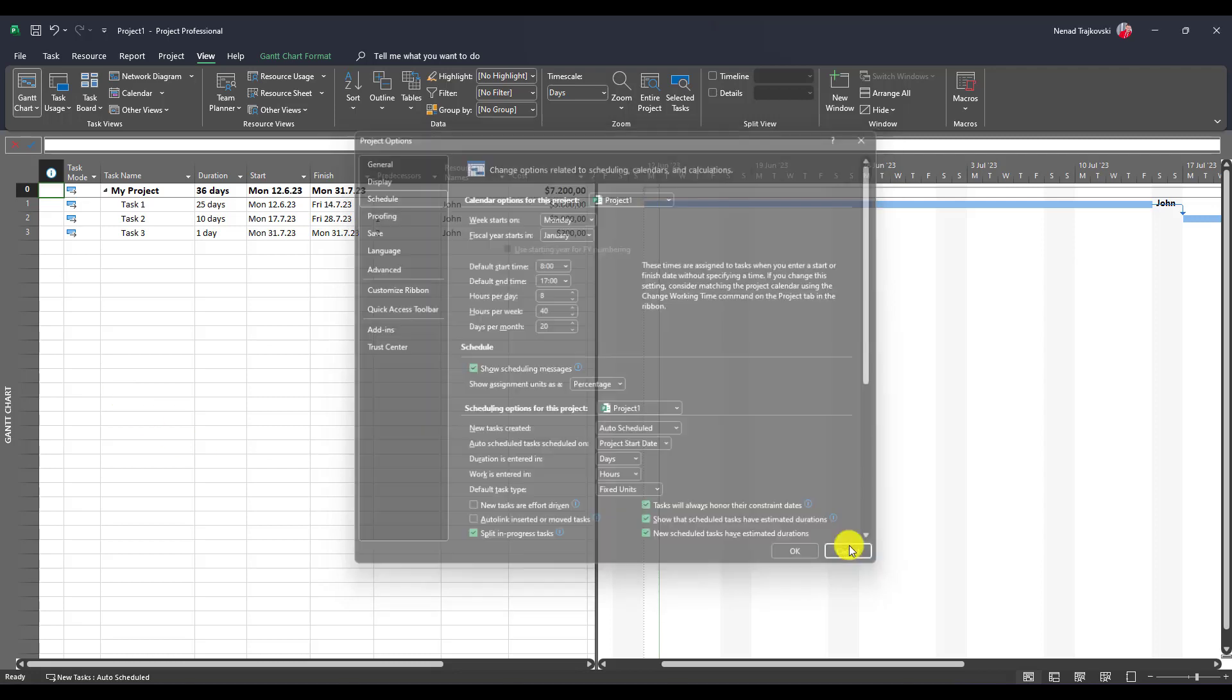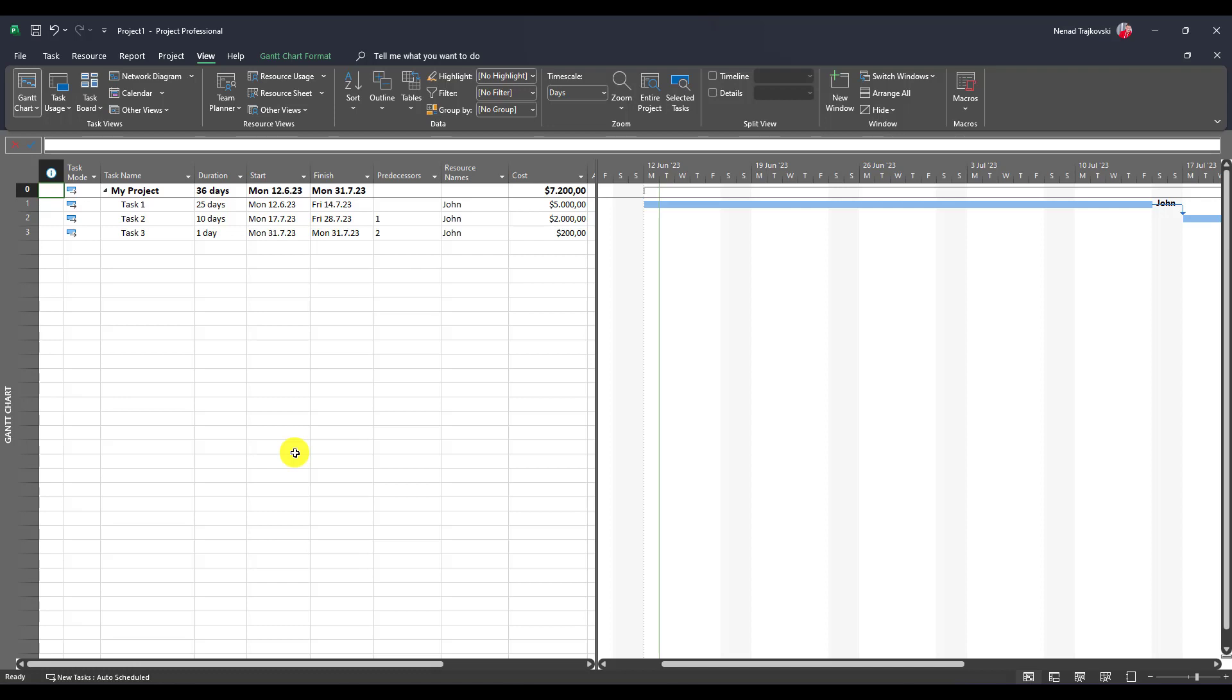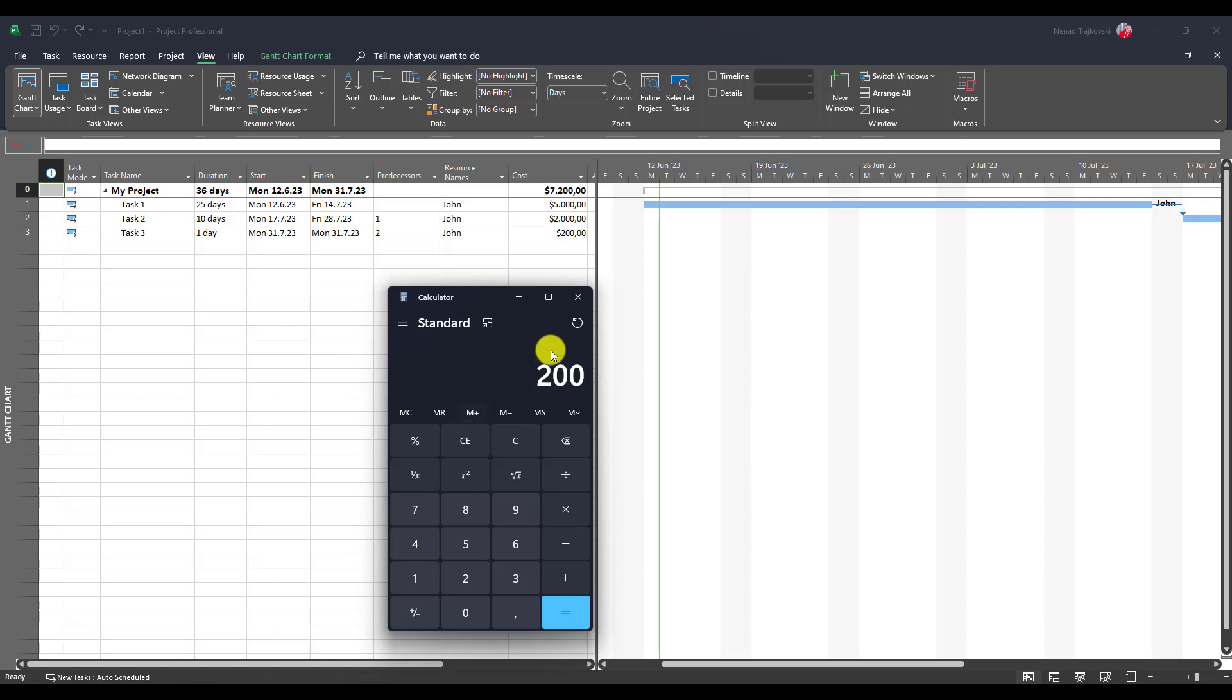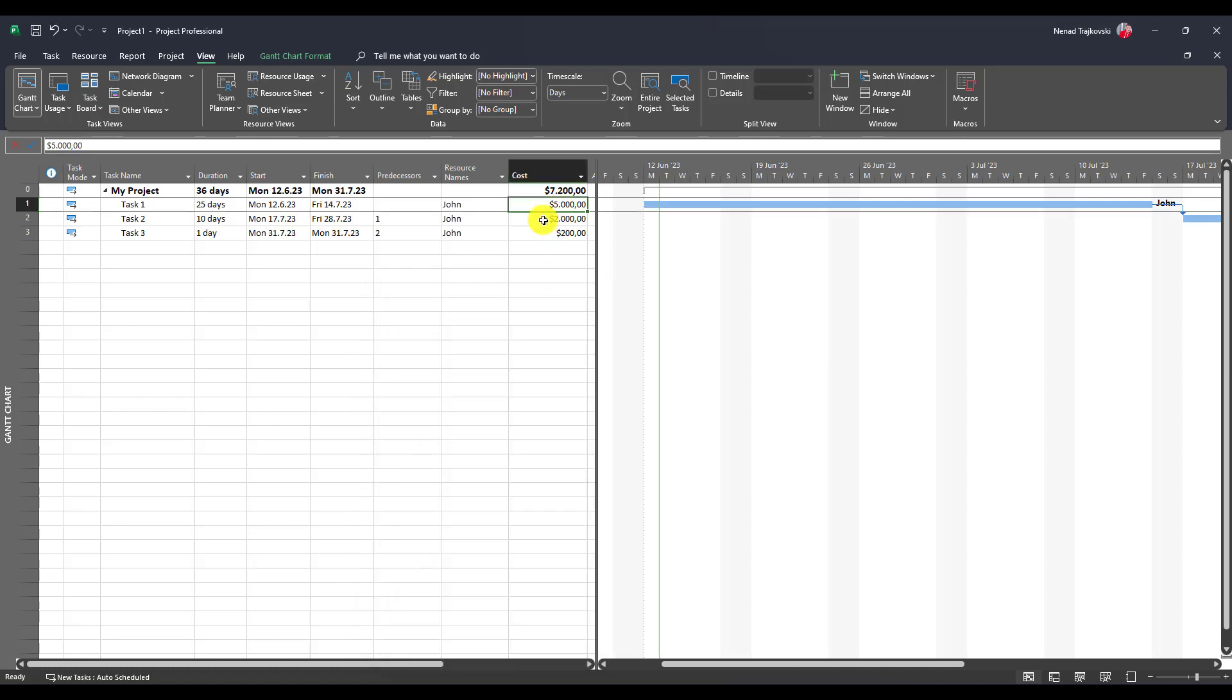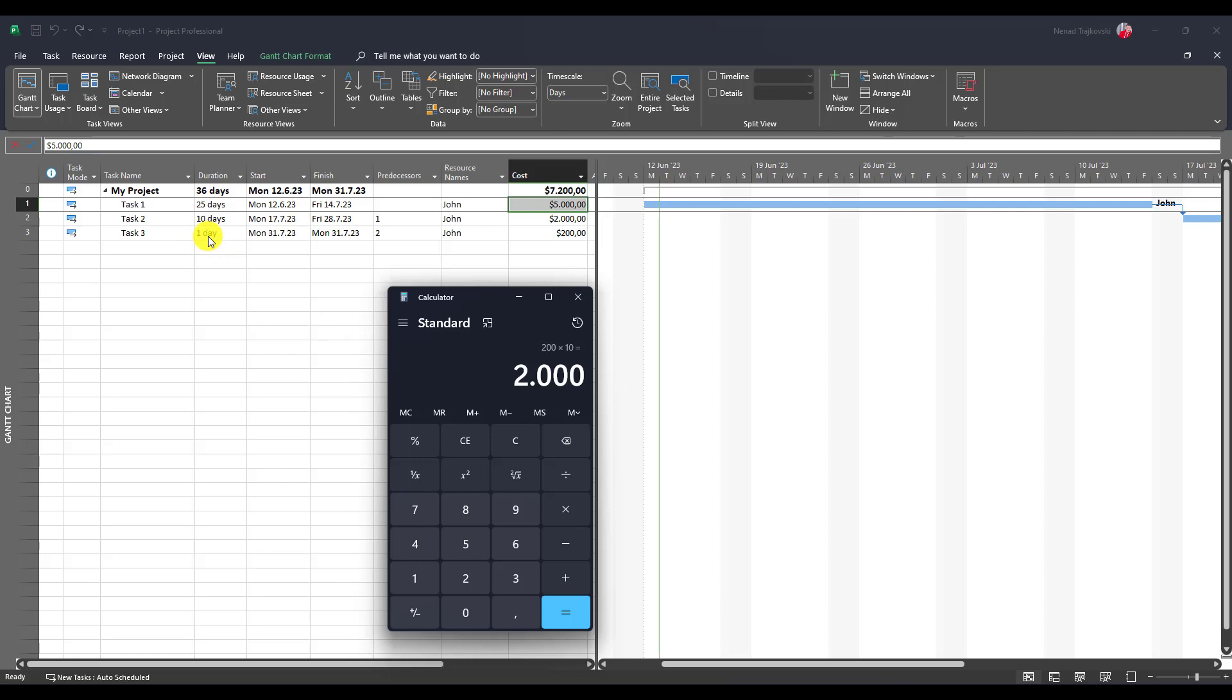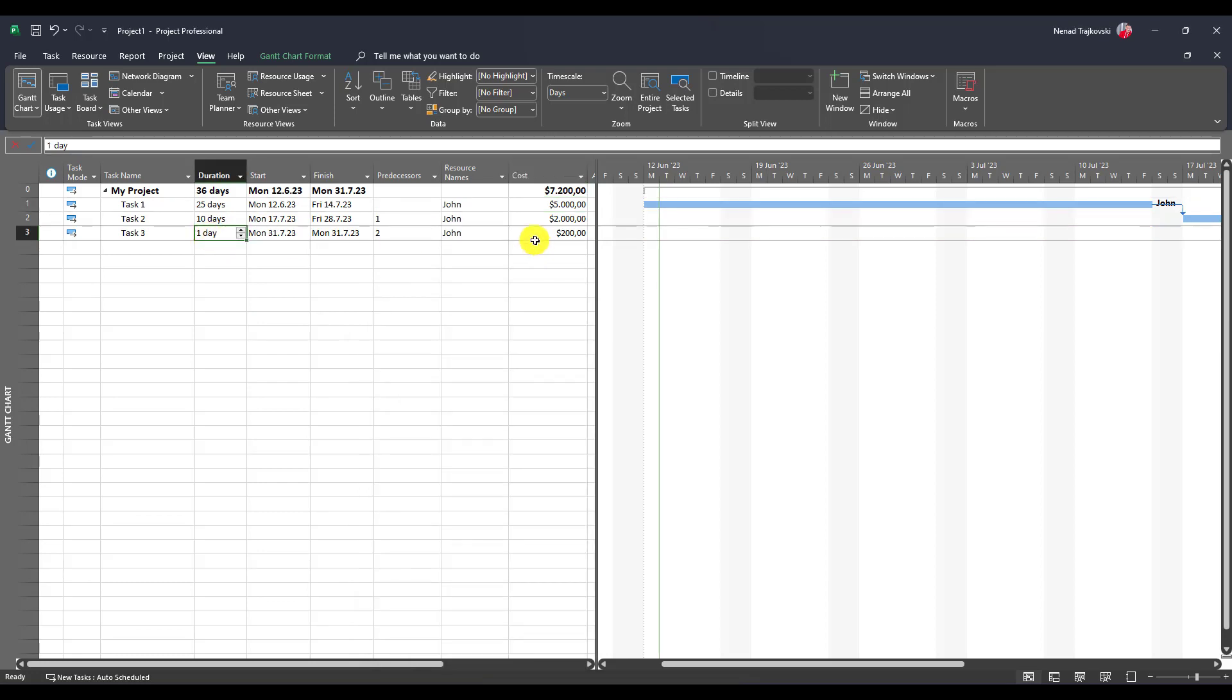Since John has $4,000 per month, it means, let me bring up calculator, that he will have $4,000 divided by 20 days, his standard rate per day is $200. Let me memorize this. Now $200 is standard rate. This $200 multiplied by 25 days for task one leads us to $5,000. This $200 multiplied by 10 days leads us to $2,000. And of course, if $200 per day, multiplied by one is $200. That's how it is calculated.